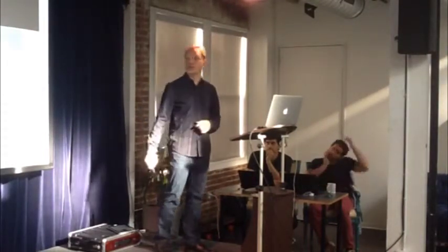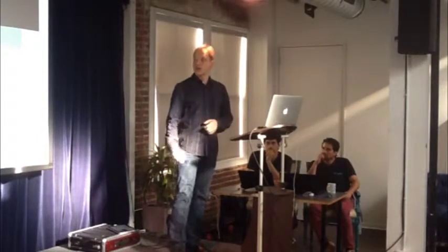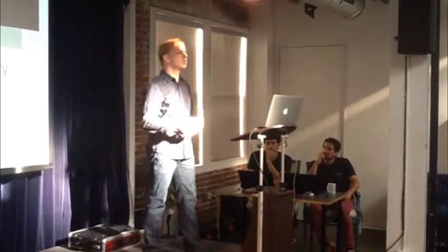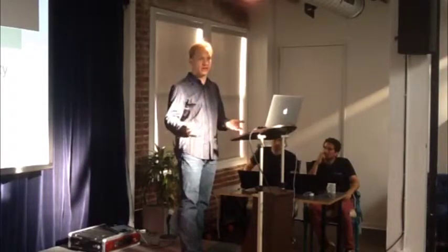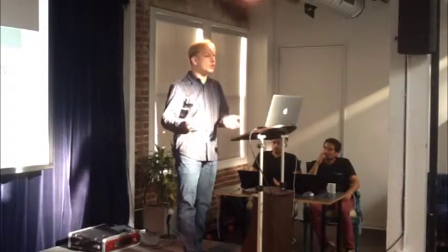The second category of incorrect estimates are a loose grouping of things that I'm going to call planning failures. So the first planning failure is unexpected technical difficulty, just like we were having here with the clicker at the beginning of the presentation. So this is the effect where you estimate how difficult a task is going to be based on experience of similar tasks, but one of the challenges with software is the software world changes so fast, and everything we build is something nobody's ever built before. So we're going to run into things that nobody anticipated and nobody could have anticipated. This is probably the effect towards budget surprise that you can do the least about.